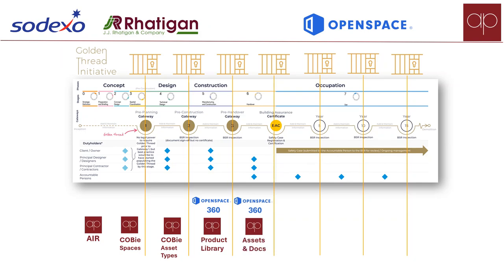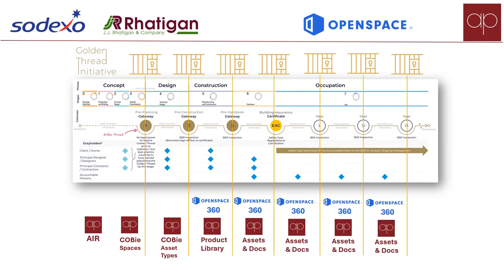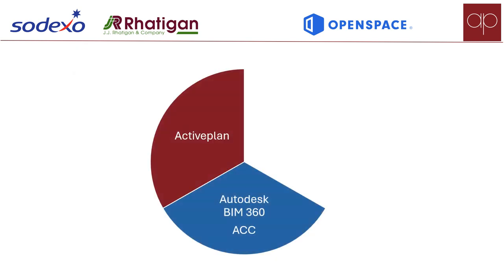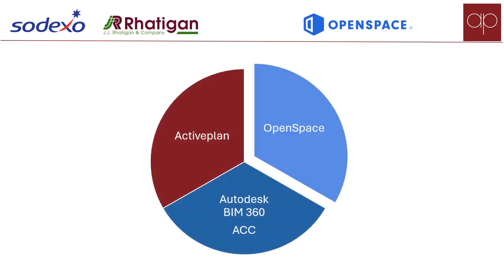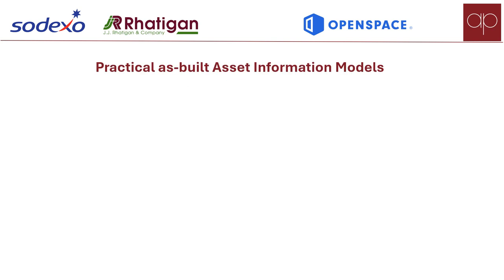Asset managers call this progressive assurance — ActivePlan validating the asset data across the construction. This will be great for FMs who are using soft landings and should reduce the risk of disputes and retentions at the end of the project. Both ActivePlan and OpenSpace are Autodesk developers and integrate with BIM 360 to help deliver a very practical as-built model at a fraction of the cost.